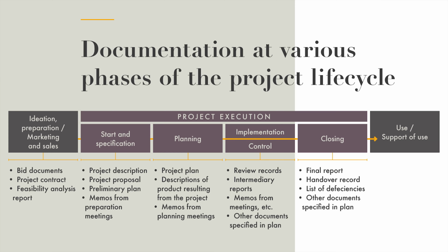There are various needs for documentation throughout the project lifecycle. Various types of documentation are produced throughout the project lifecycle. Even before the project has started, we have typically produced a number of documents, such as a feasibility report, a proposal or bid, and hopefully a contract. During the start, we should create the project description, a project proposal, a preliminary plan, as well as a number of memos from preparation meetings.